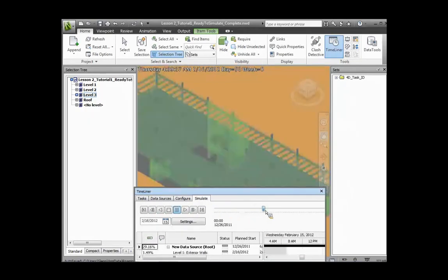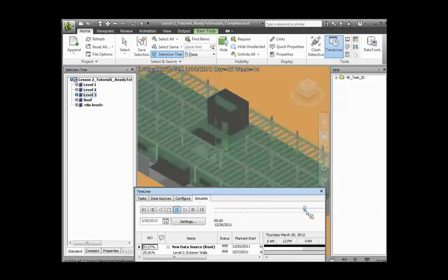And this is actually very useful because I can start using this information for materials management and figuring out if the right things are ordered that I need on site. If I want to make sure that I can go ahead and rip the beam systems on the second floor, I have to make sure they're available on site, they're cataloged somewhere. We need to store some information about them.